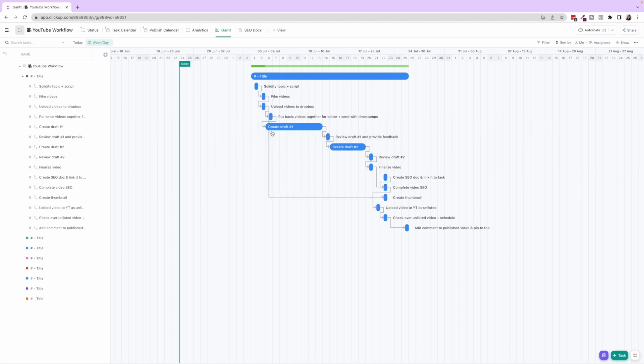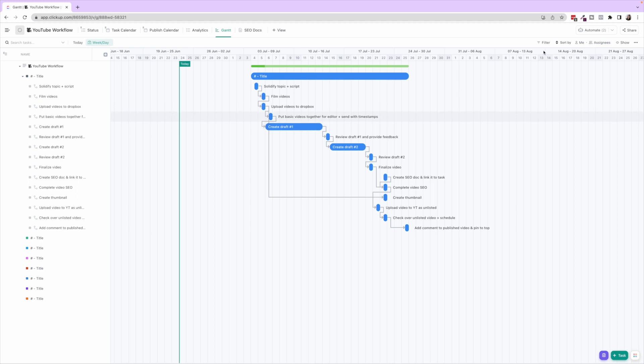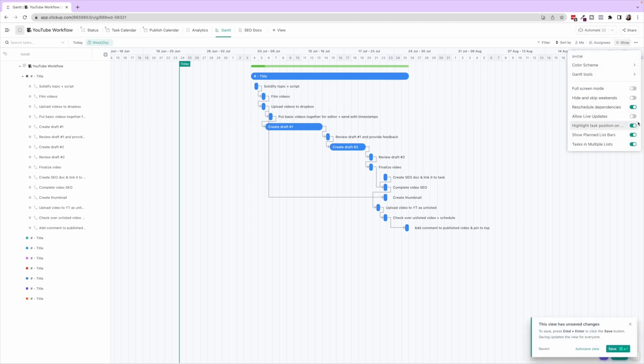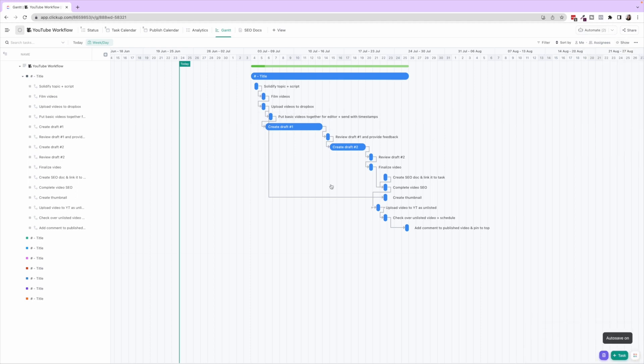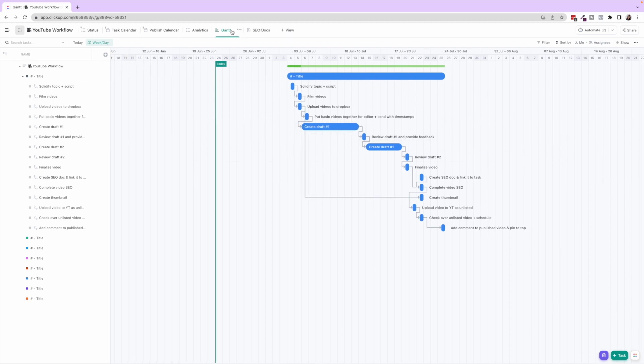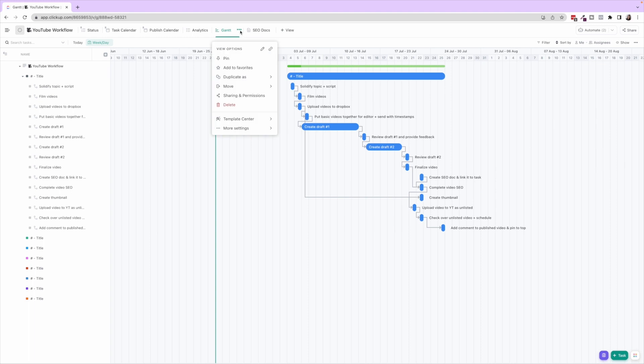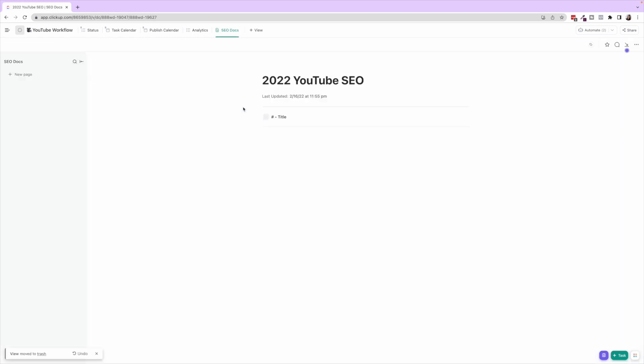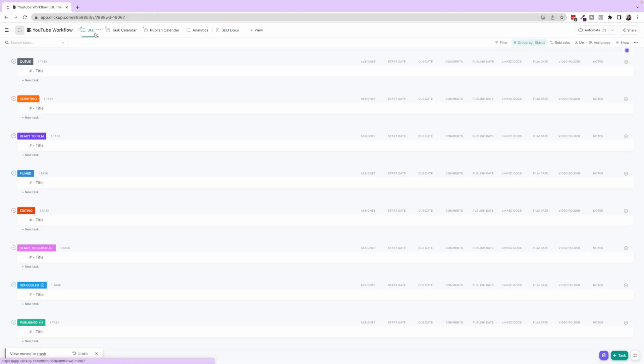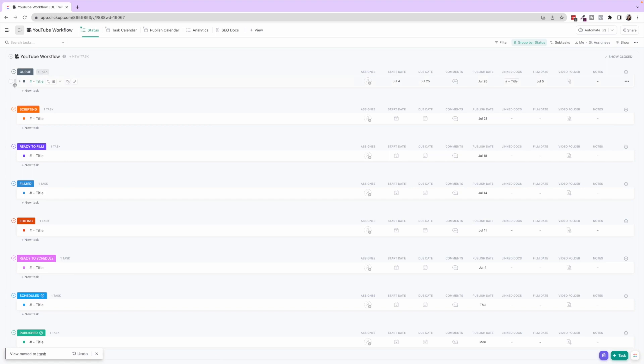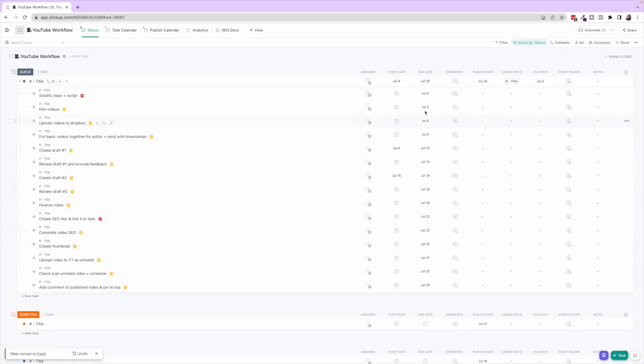You can see this here. You can also move these and it would shift everything over. So if you click Show Reschedule Dependencies, you can drag these and everything will move accordingly. So I'm going to delete this Gantt view, I just wanted to show you how to do that.